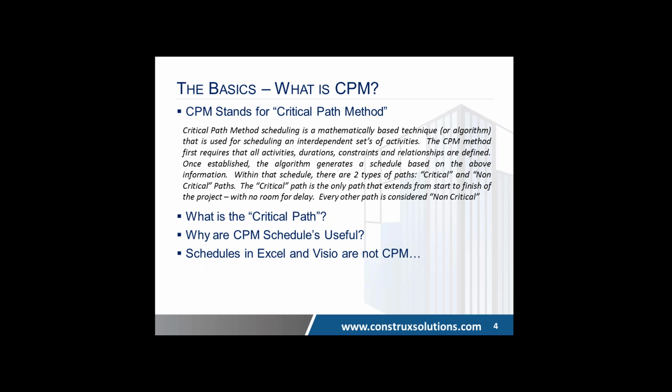So any activities that are delayed up until that point will push out all other follow-on activities, and all the activities that are complete up until that point, all follow-on activities kind of line up in suit. And that's why it's important. You have a flow of activities. You've incorporated that into this program. And what this program does for you is constantly keep you informed of where you stand when you update it and what's to come next based on what our original plan was. Now, Excel doesn't allow you to do that. Visio doesn't allow you to do that. But these programs do allow you to do that, and that's why it's useful.